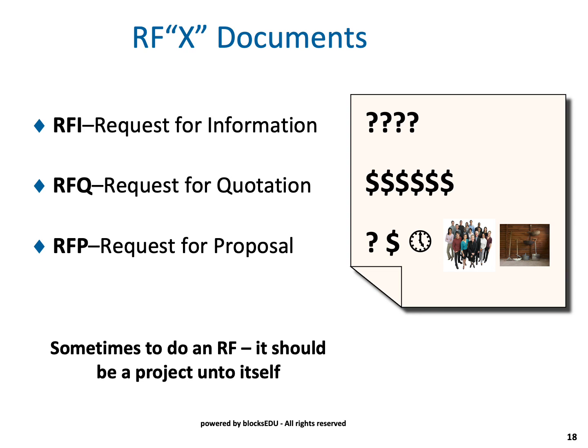So what organizations are doing is they send out what's called a request for qualifications, where they send it out to the thousands of people, but they basically have some criteria that qualifies that organization to go on to the next stage, which is the request for proposal.